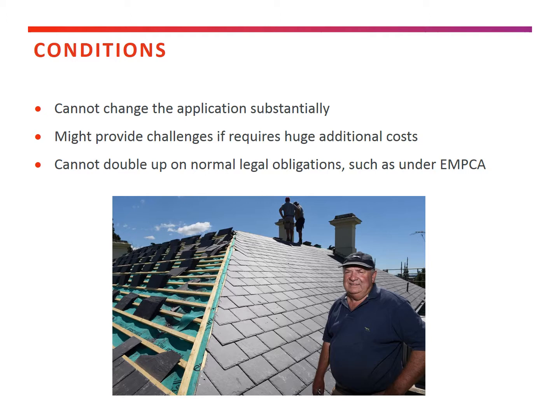So the key to a condition is that it needs a time frame, it needs to be clear, and it needs to be related to a planning purpose. So you can't double up on something that's just a normal legal requirement. For example, something around the Environmental Management and Pollution Control Act, for example, noise.